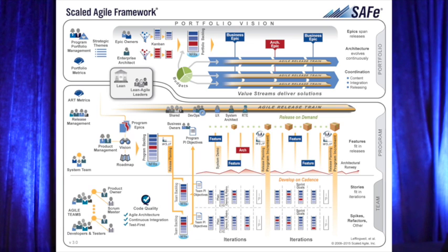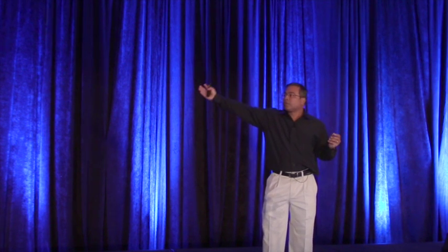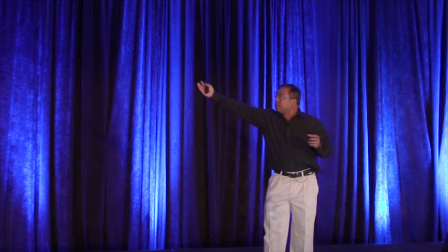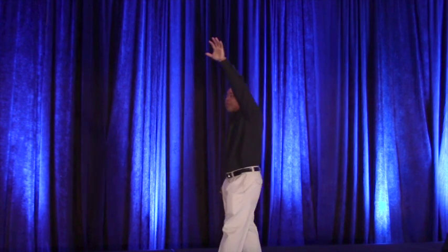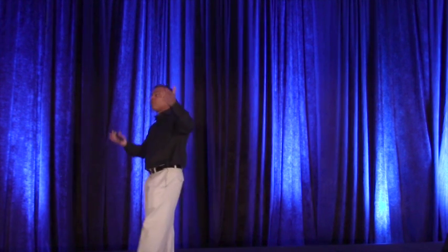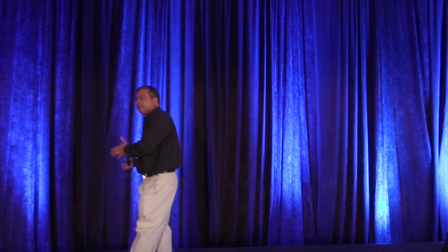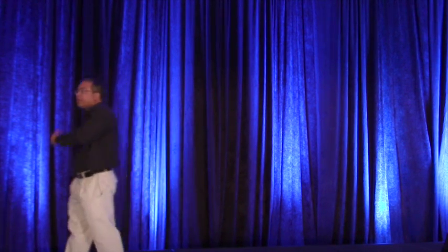Well, our Agile PMO, known by another name, is now called a release train. Our chief ScrumMaster there now becomes a release train engineer. This particular release train has what they call a program backlog or a program increment that they'll deliver. So multiple teams combined into a program increment, into a release train, and a delivery.